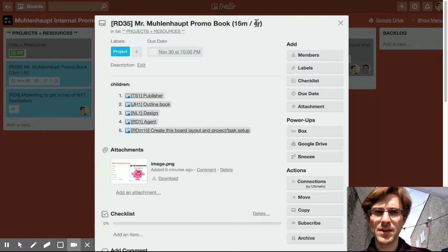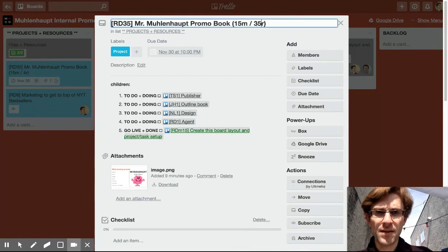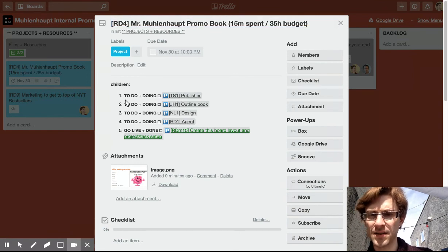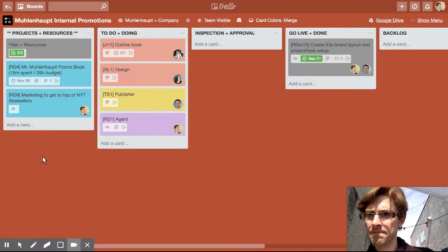Actually, you know what we should do here is 35 hours budgeted. So 15 minutes spent out of 35 hours budgeted. And now we can look at this and see, okay, we've actually only got 4 hours of tasks. So I'm going to make this RD4. And that's what's left on this particular project now.